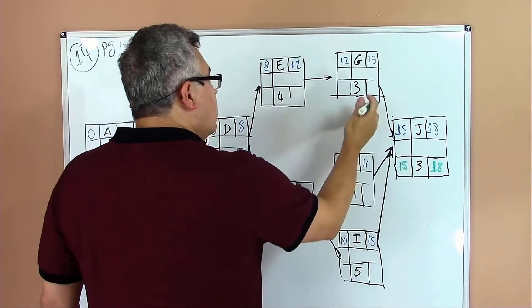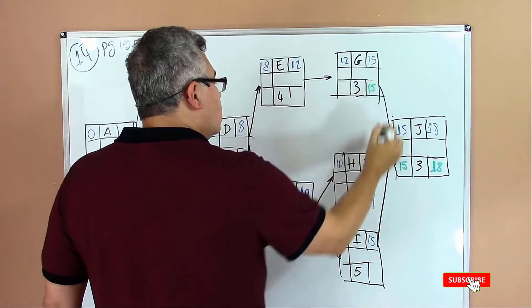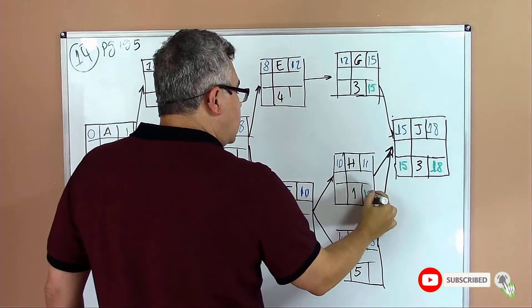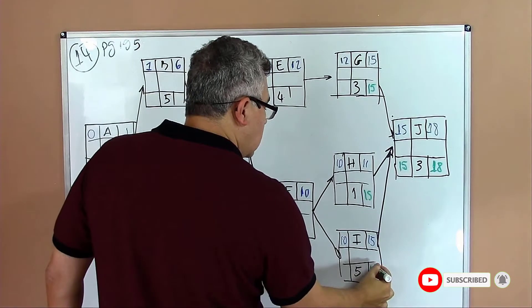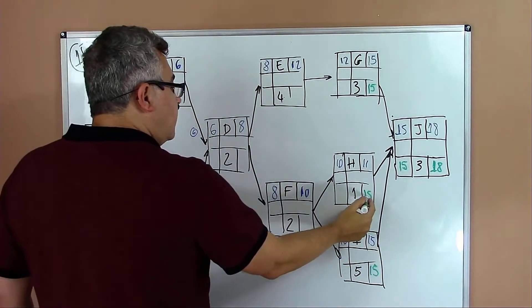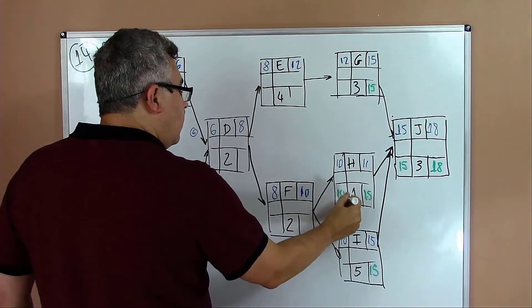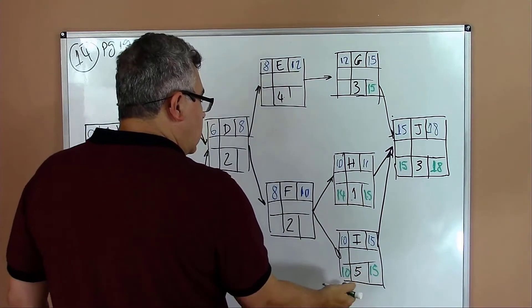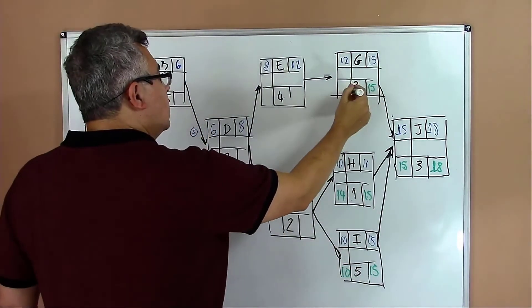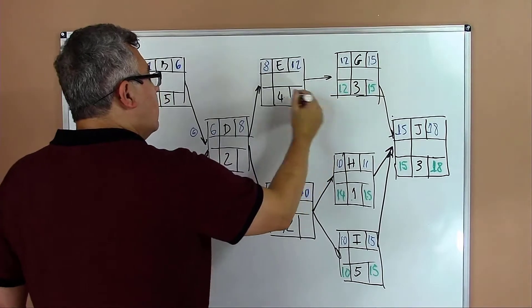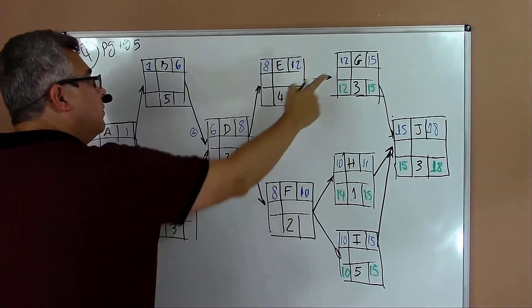In the backward path we go from eighteen and start subtracting the duration. Eighteen minus three equals fifteen. Then I move fifteen to the predecessors and I start computing. Fifteen minus one equals fourteen. Fifteen minus five equals ten.